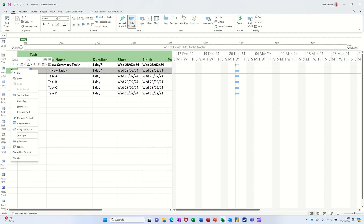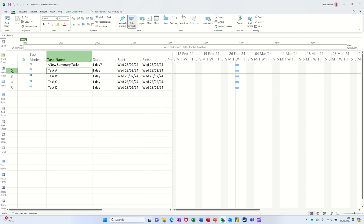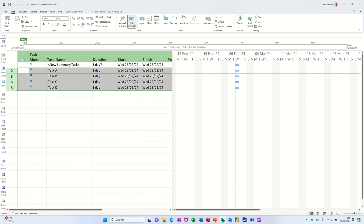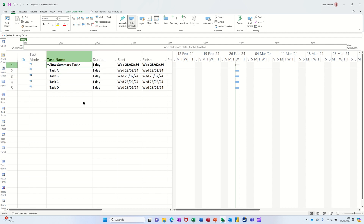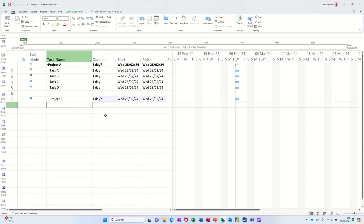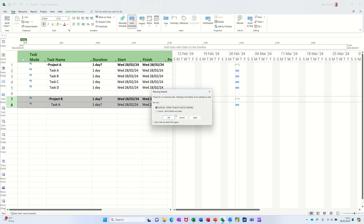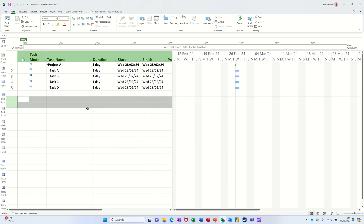This is how you get rid of a task — you highlight the whole row, right click and delete task. So now we've got a summary task. If I highlight these four I can indent those underneath the summary task and it becomes emboldened, and I'm just going to over-type that with 'Project A'. I could also do it manually by clicking underneath and going indent — it does exactly the same. That's how you do a summary task.